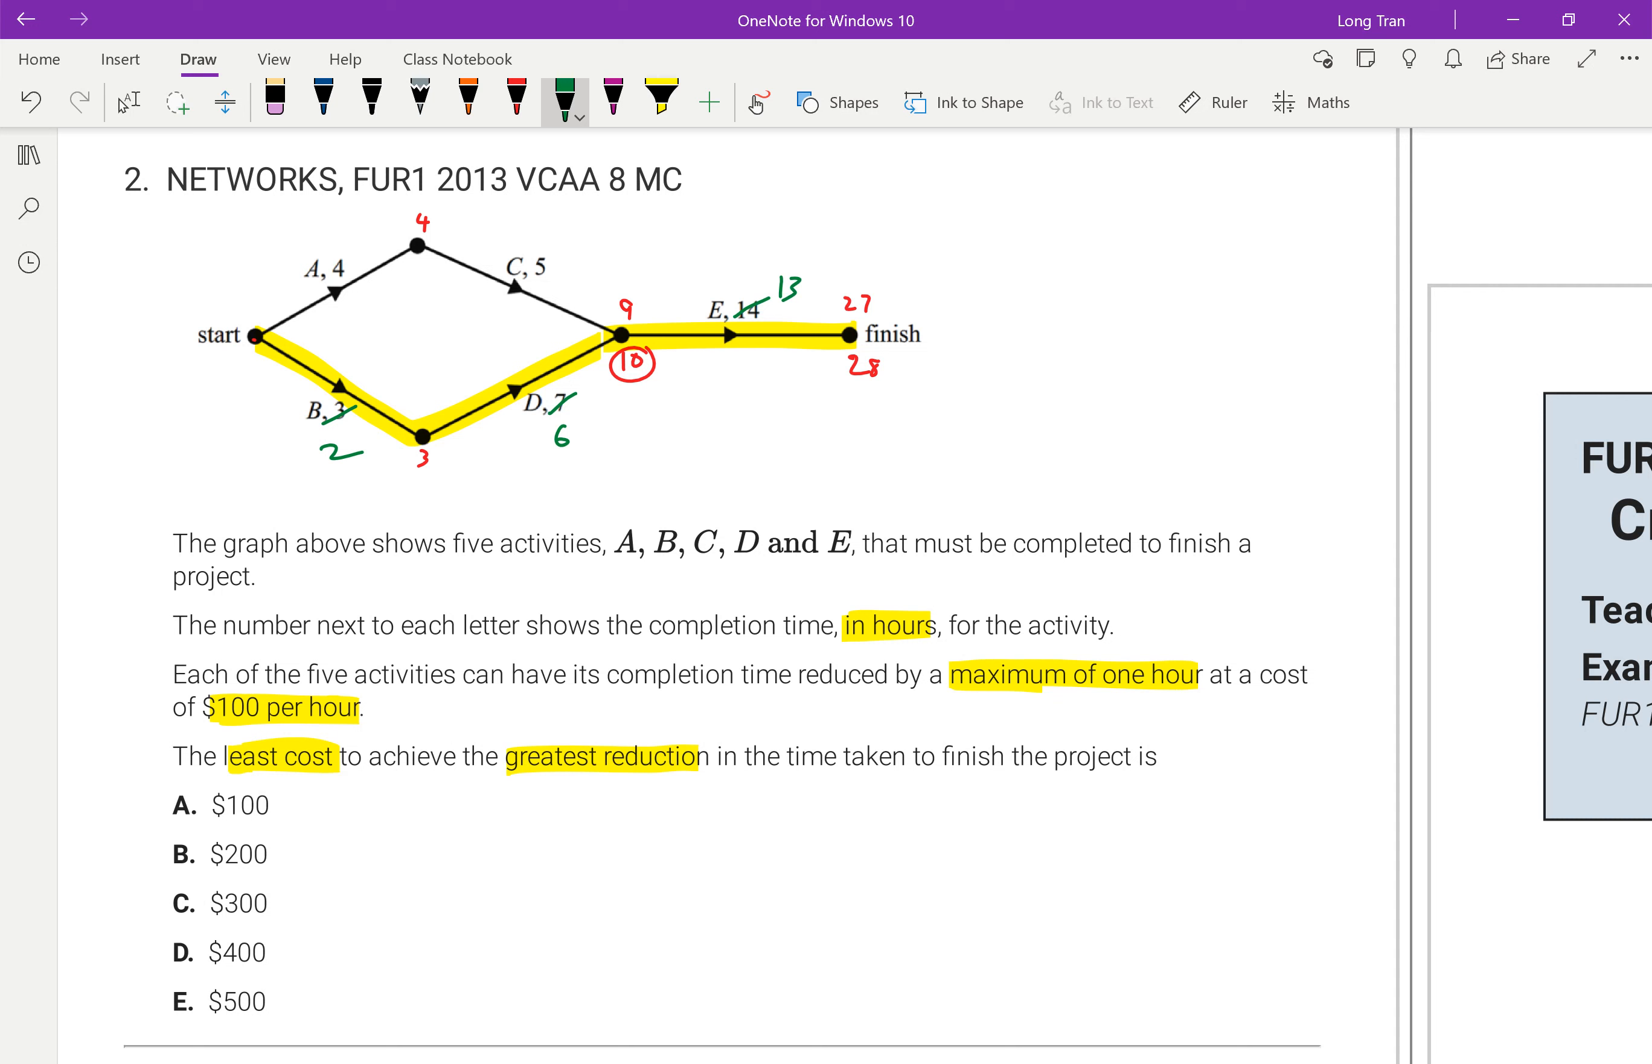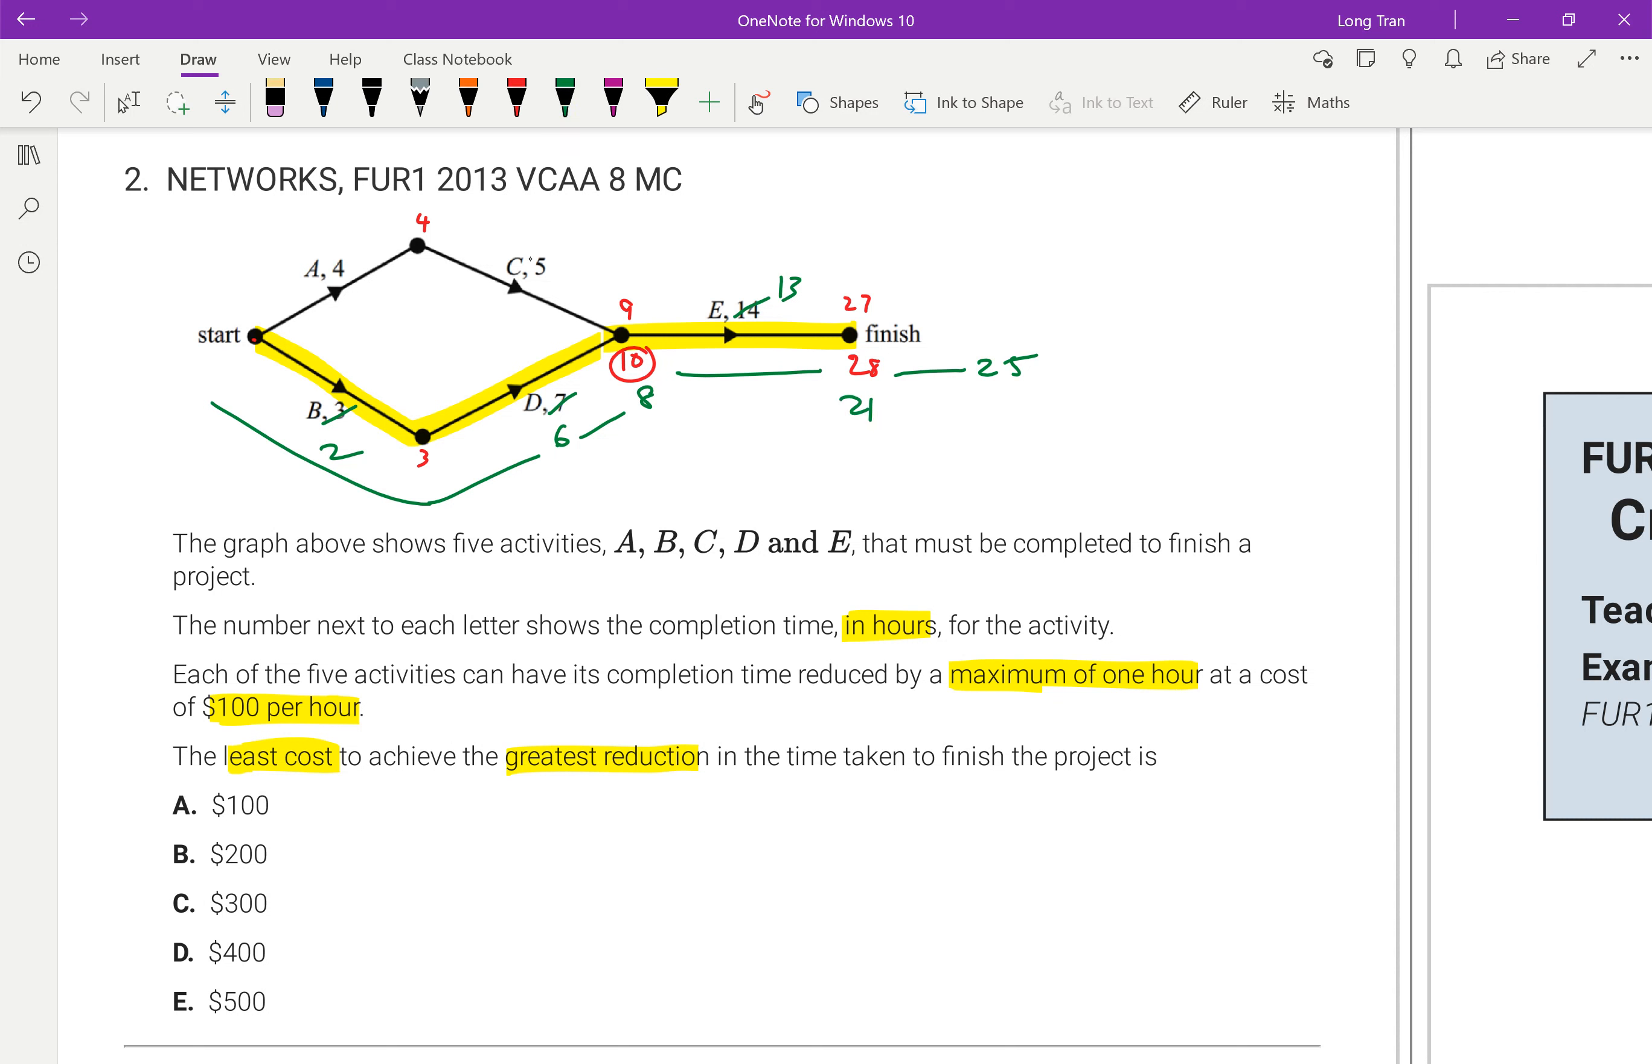Now, if I did do that, can you see that my value now becomes 25? Because I took off three hours. So it becomes two plus seven is nine. Wait, is that right? Two plus not seven, two plus six is eight. And eight plus 13 is 21. Did I reduce it by that much? I thought I only took off three. So two plus six is eight. Eight plus the 13 is definitely 21. So it feels like 21 would have been the answer, right?